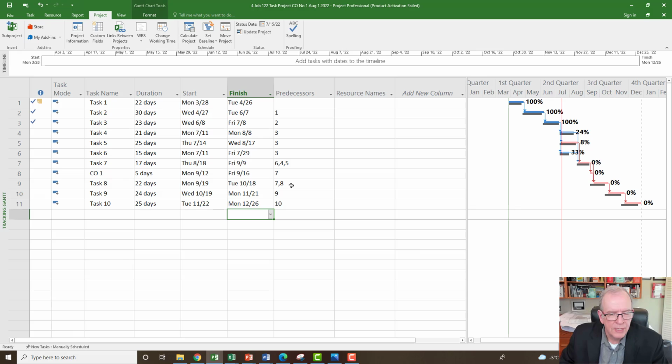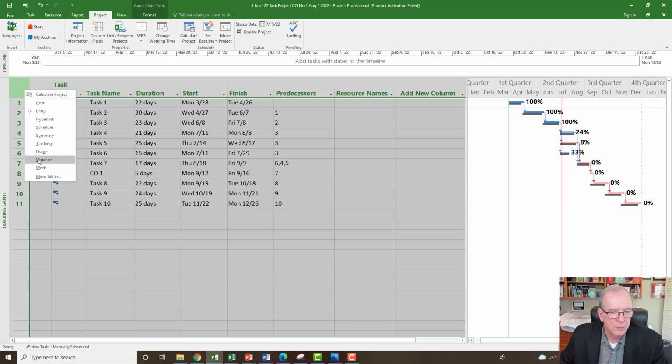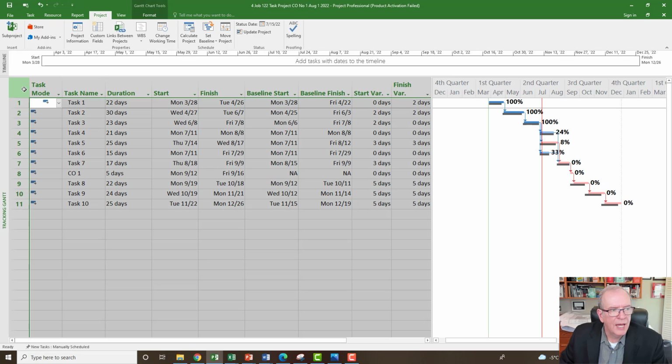So we've got that linked here. We can see the impact of that on our project schedule. We might not need that link there anymore. And if that's the case, we could get rid of that number 7 if it's got to flow through there. There's no point in creating redundancies in your schedule updates, because then you start getting too many links that aren't necessary when you've got a flow through. So in this case, it doesn't change the variance anything, but it makes for a cleaner schedule to be sure.